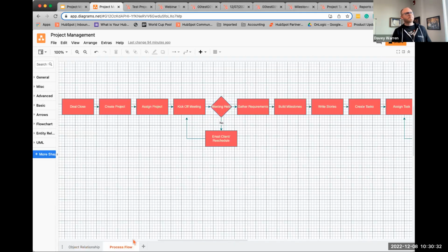I'm going to give you the ugliest process flow map of your life, because the complicated ones aren't fun to look at. So you need to build out what your process is in managing a project. This is a very simplified one, and it could have a whole bunch more stuff in it for communication and who does what. I would suggest putting it into lanes, like swimming lanes of who's communicating where and when. So project manager versus QA versus client can be broken down in this, which would be really awesome when you build it.